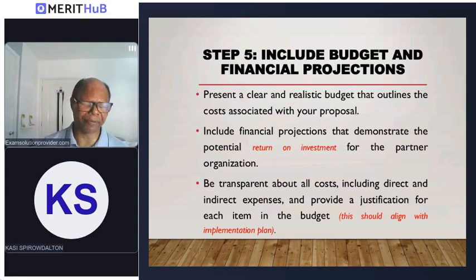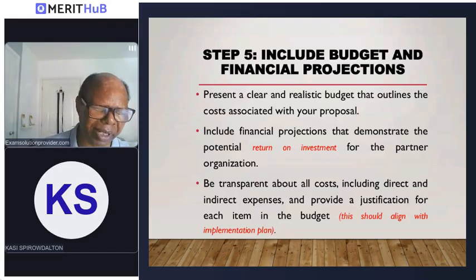Now, the difference that you have from one year to the next year: I'm sure it's the same in Uganda. People expect that they're going to have an increment at the end of every year. So you add 10% of what they are earning now. Okay, that's what you need to do.